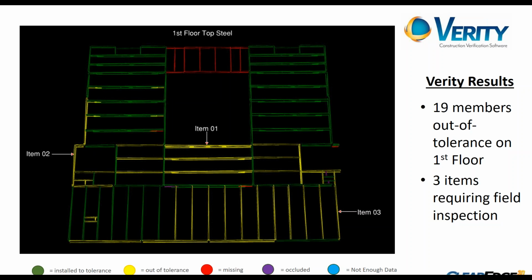It's good to see that the stuff that isn't supposed to show up in the report didn't show up in the report. And then we had gone through each item and basically did a screenshot of the overview and tag each item. So the hardest part of this job was to make a 3D report into a 2D report to hand to the guys in the field, be able to use the 2D report in the field, and be able to take it out with them, review the items, and say,